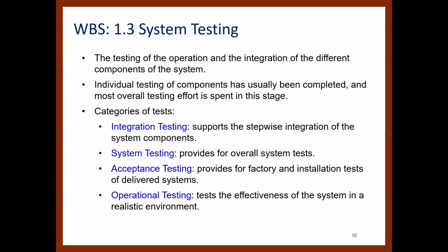First, integration testing supports the stepwise integration of the system components. System testing provides for overall system test. Acceptance testing provides for factory and installation tests of delivered systems. And operational testing tests the effectiveness of the system in a realistic environment.